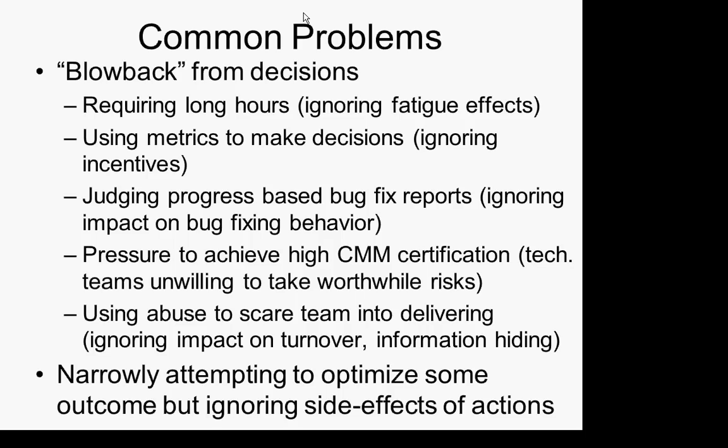For example, project managers may require long hours. For a short time that's okay — you can do a sprint. People have high morale, they get the project done, deliver, and then you let people take a vacation or cut down the hours. But some projects just push, push, push. The velvet sweatshop, they used to call some companies. And these things have effect — they have effect in terms of built-up morale.